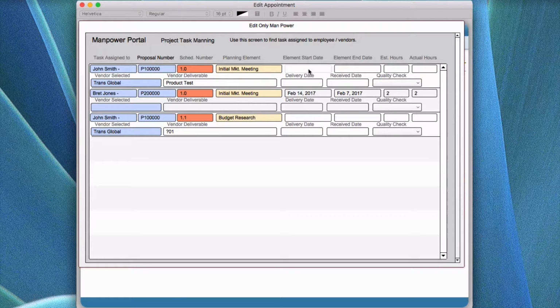And of course, if it was actually completed in here, and a lot of these example ones I didn't finish off, but here's one right here. You can see the P020, same thing. This is the date spans, and this is the hours that he was supposed to spend in there. He did an estimated 2 hours, and the actual was 2. So this could show you where, if you wanted to update the actual calendar, because this information is now completed.